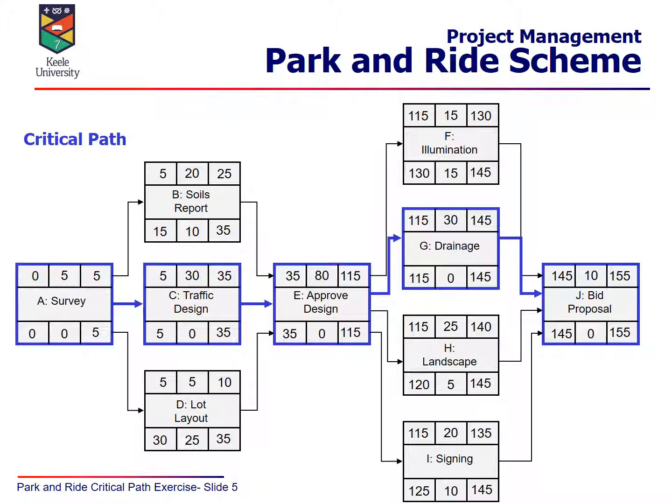The other activities are non-critical, but of course it doesn't mean we have infinite flexibility. If you delay some activities, it might be that they suddenly become critical in themselves. Okay, so it is dynamic when you're going through the project, and you must ensure you don't take your eye off the non-critical activities. The non-critical activities also enable us to shift our resources around, smooth out our use of people or equipment and so on through the project. So that gives us some flexibility. The normal thing is that you don't have to start every single activity at the absolute earliest that you can do it.